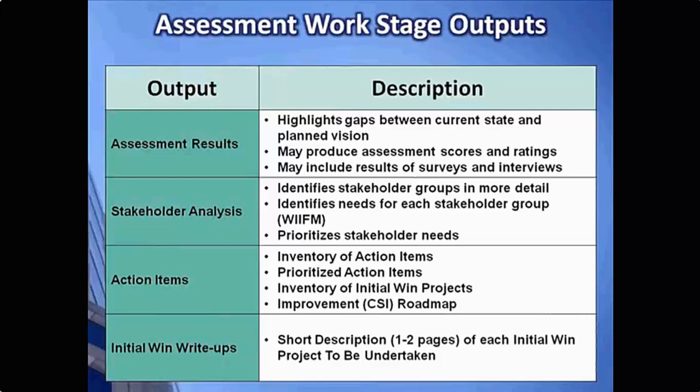Here are the key outputs from the assessment work stage: assessment results, stakeholder analysis, action items, and our initial win write-ups. The assessment results will highlight the gaps in the findings that we see between the current state and our planned vision that we decided in the ITSM visioning stage. So we're going to be comparing how well we stack up against where our target state needs to be. Typically, you may hear the term gap analysis, and that is the essence of what our assessment results will show.